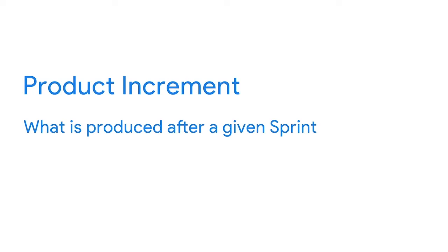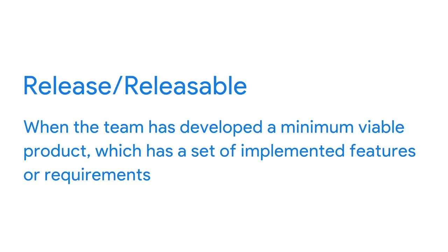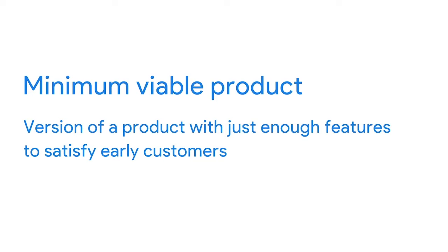A product is releasable when the team has developed a minimum viable product — a version of a product with just enough features to satisfy early customers. At the end of each sprint, only items that have met the definition of done are considered part of the product increment. Anything that is not done goes back to the product backlog.